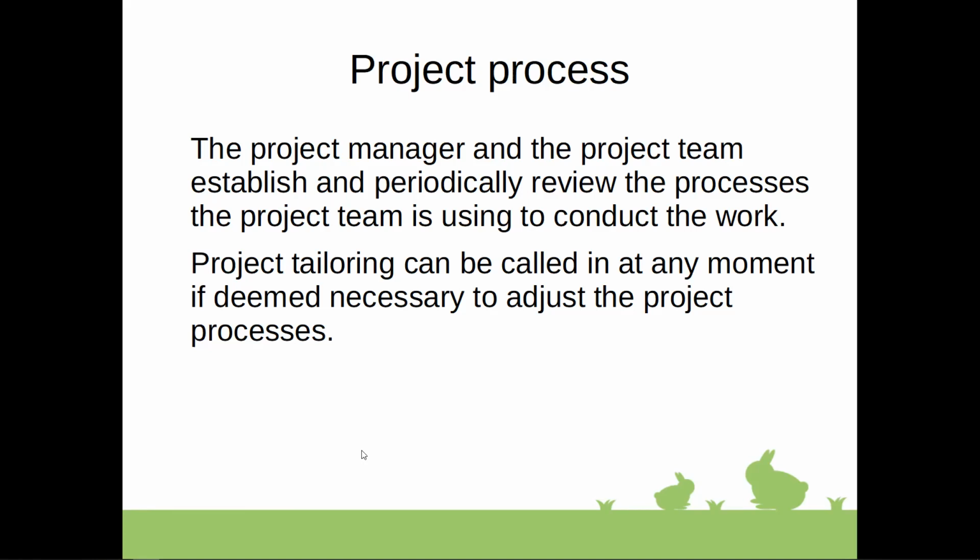And the third method of optimizing the processes within the project is identifying the best funding spent. This question helps determine if the resources and funding applied to the current task are reasonable, or if it's better to move the resources to another activity, another task, to optimize the value delivery towards the project goals. So this is again part of regular review of the things happening within the project.